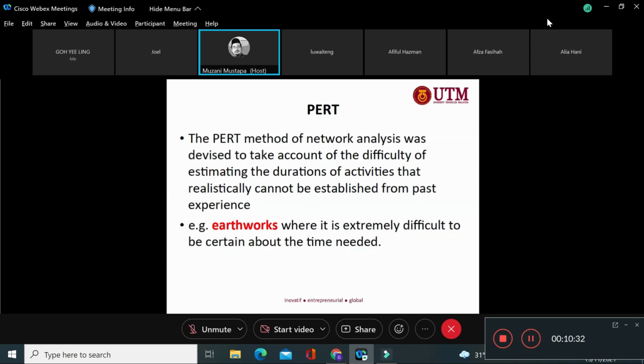So when the planner comes across this particular situation, they have to think about time conditions that are very actual, nearest to their time estimate. As a planner, they will ask for a lot of information and shop around for all the time durations, such as from the subcontractor, the machinery time calculations, the productivity and output of the machine.